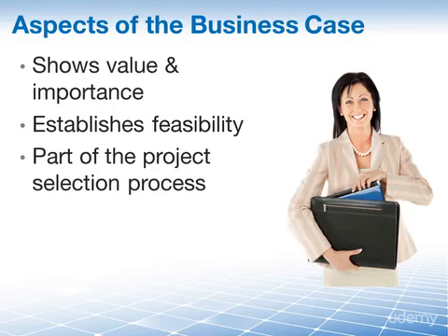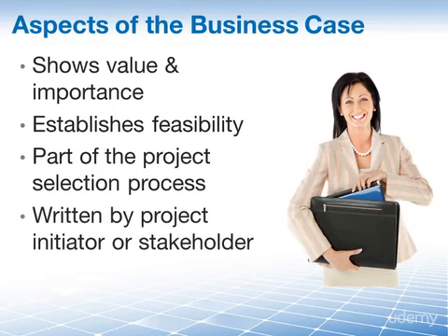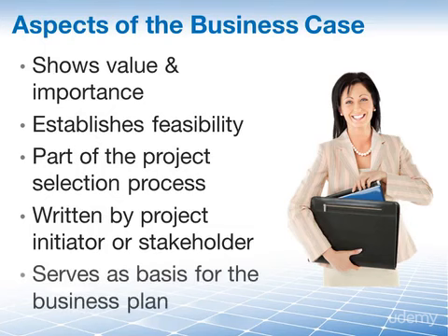Creating the business case is a part of the organization's project selection process. Therefore, the business case precedes project initiation. It usually is written by someone other than the project manager, the project initiator or stakeholder. In some cases, I've seen someone within the organization's PMO, the Project or Program Management Office, who is tasked with this responsibility. But you can even go further and add more details into the business case, and as such, the business case can then serve as the basis of the business plan at a later date.